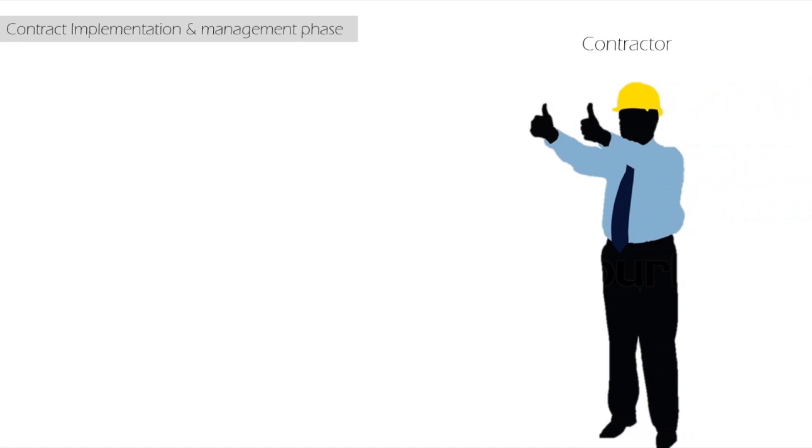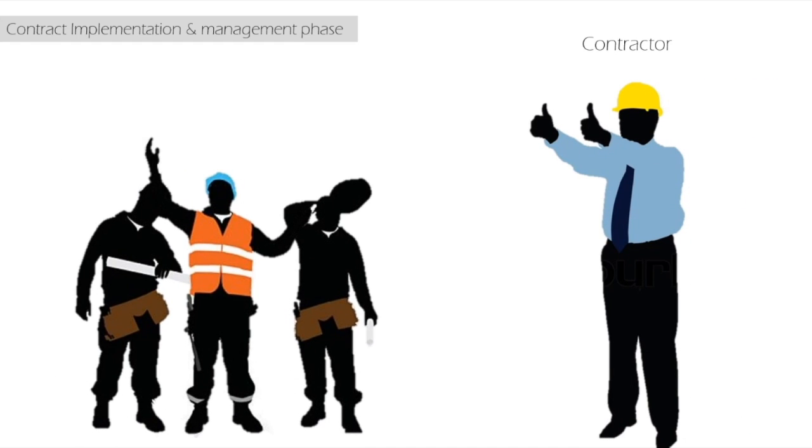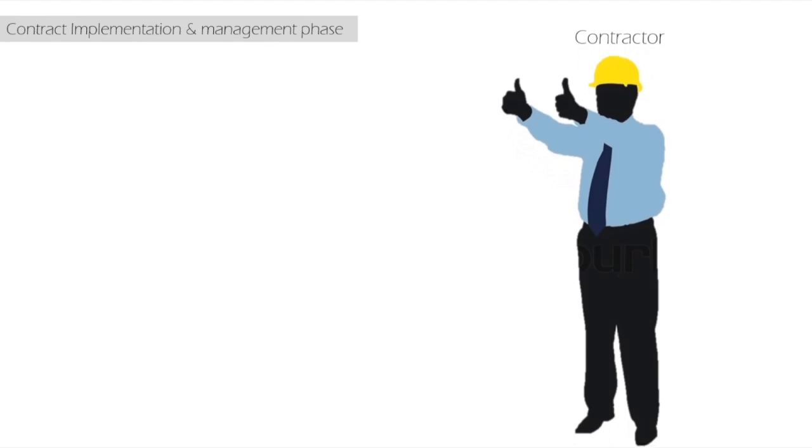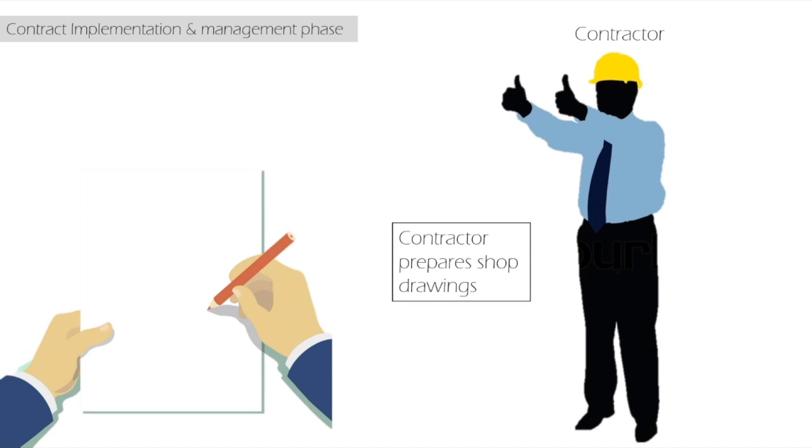consultants. The contractor will hire subcontractors to perform part of the construction work. This is because subcontractors can provide expertise in specific areas of construction. The contractor will prepare the shop drawings for prefabricated components to show more detail than the construction documents.